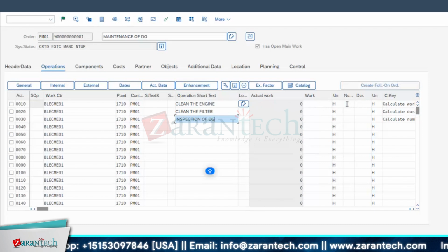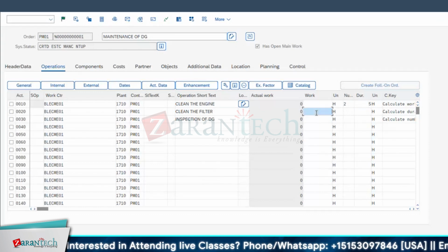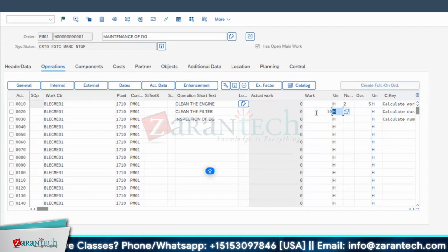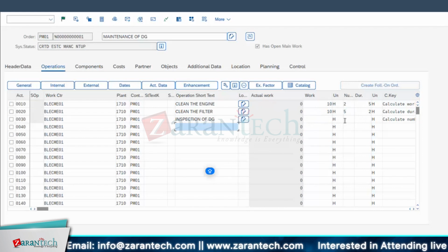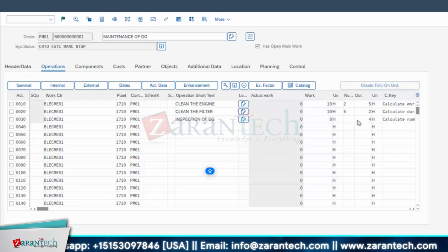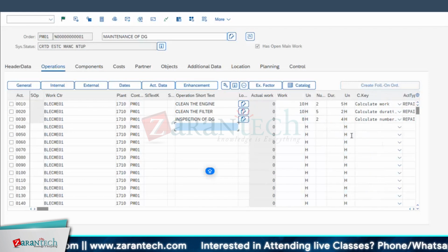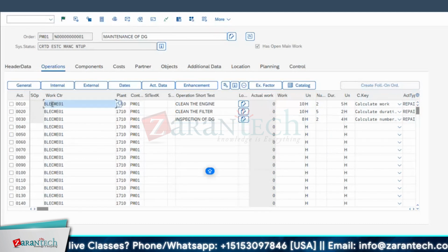Now the first one is calculate work, then here 2 manpower plus 5. Here duration, then you give over here some 10, here some 5. See, here it has come, duration, and next the numbers. Go for work and capacity, some 8, duration is 4, then capacity it will come as 2. Like this we can provide straightforward. Now see 10, 20 and 28.